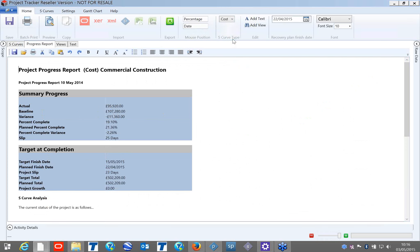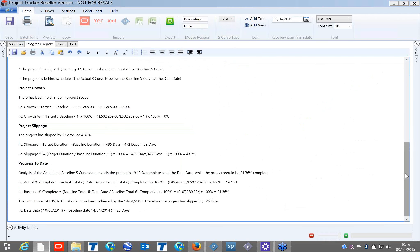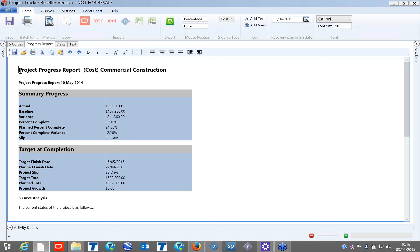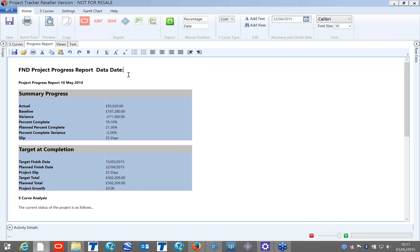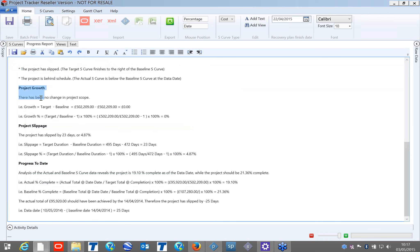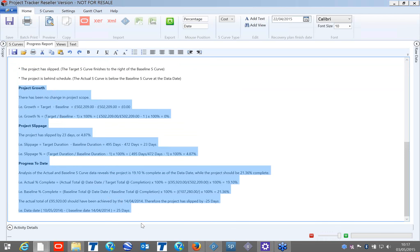Switching to cost, it gives you the report for cost: what was your actual cost in Primavera, what is the baseline, what is the variance, and the target finish date for cost. This is a free text area — you can put your company name, for example 'FND Project Progress Report', and type the data date. Whatever you would like to change, you can simply make changes here and print out directly — no additional Word or Excel import/export needed, which can get complicated and introduce human error. At the bottom, it shows how values are calculated, which is useful for planners.